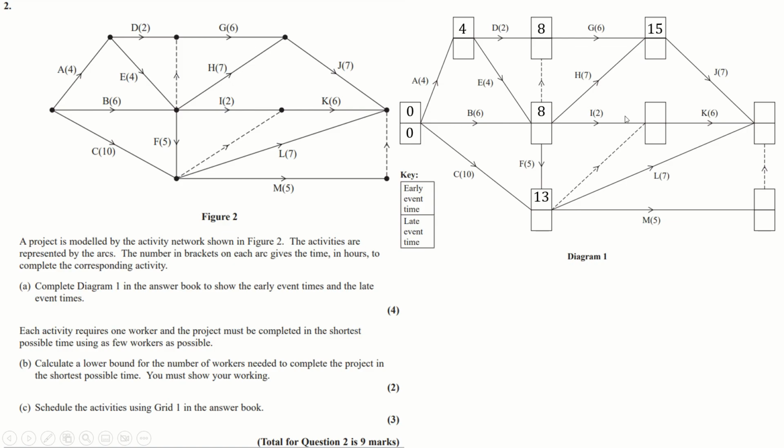Here is just going to be 8 plus 2 or 13 plus 0, which is the maximal being 13. I'm obviously being much more careful now because I don't want to embarrass myself further. Is this going to be either 15 plus 7 or 13 plus 6, or is 15 plus 7 bigger? And all the way down here we've got 13 plus 5 is the only way to get there, which is 18, and then of course 18 is...